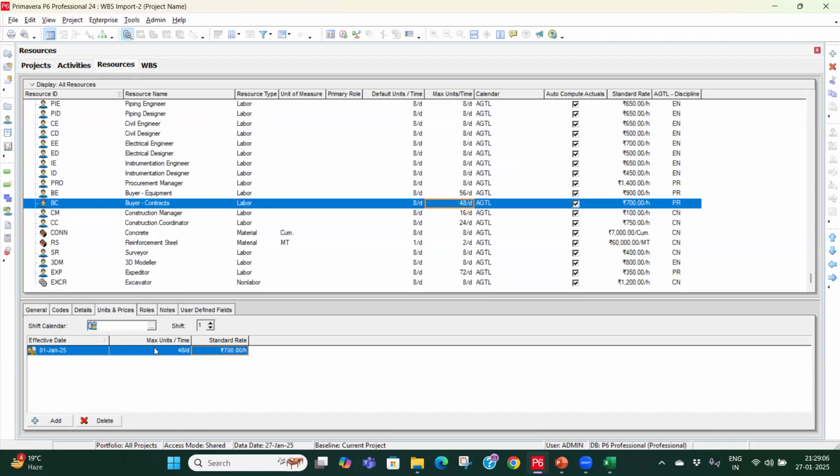No, you are increasing this max unit. So it is already increasing; it is taking that 4 times you are considering for this particular resource type. Or what you can do, if you want to show individually, name wise, you can put Amit, or let's say Sham, and in brackets HVAC engineer, and you can assign it 4 times. But in that case it will be labor intensive and time taking also. So what we generally do is assign a single resource for a category, and then increase the maximum unit.